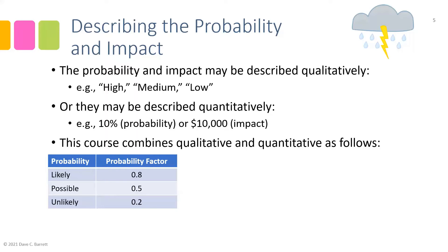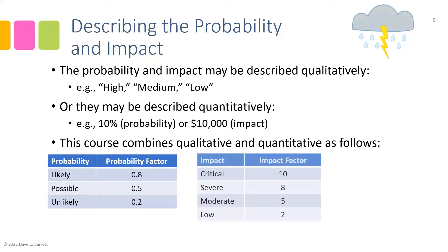Otherwise we'd get very few likely designations, since 80% is a very high bar — almost certain to happen. Similarly, the impact follows a parallel pattern where the project team selects whether the impact is critical, severe, moderate, or low. The textbook has descriptions of what each term means, and an impact factor is assigned: 10 for critical, 8 for severe, 5 for moderate, and 2 for low. We see here the conversion from qualitative to quantitative.